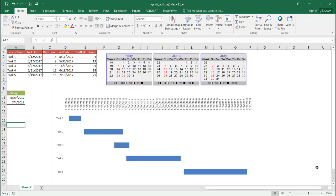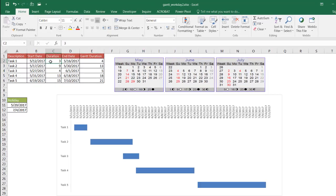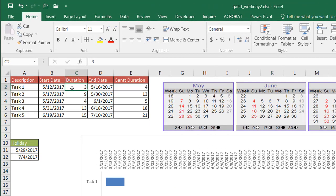Hi, in this video I'll show you how to create a Gantt chart that takes into account work days and also holidays when charting it out. We have our Gantt chart here with a start date of 5/12 and 5/16, with a three-day duration for work days respective to the weekend. So 5/12, when you think about it, is here with three days: the 12th, 15th, and 16th. So the end date is going to be the 16th.